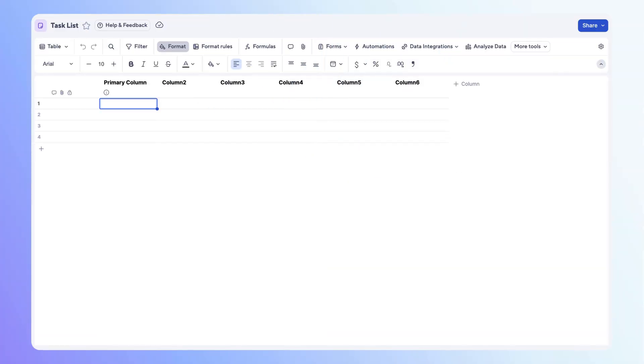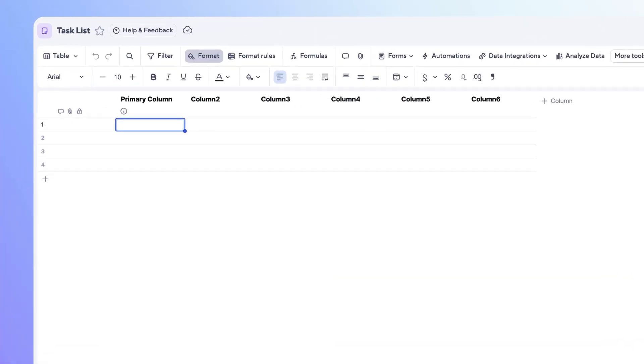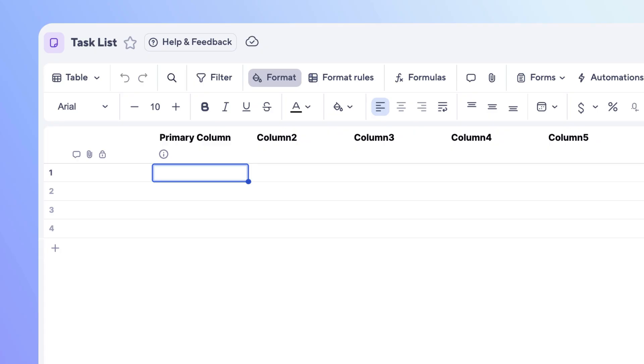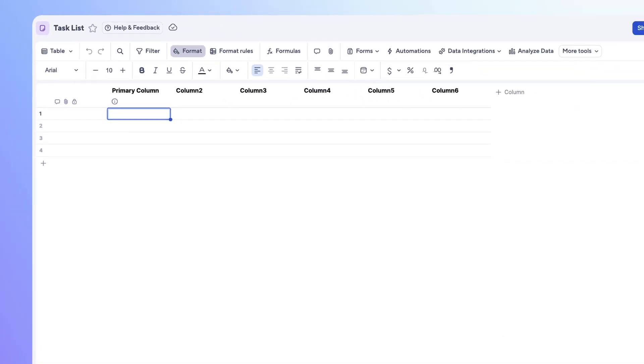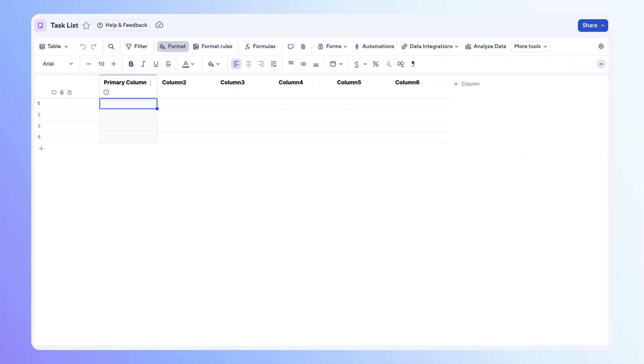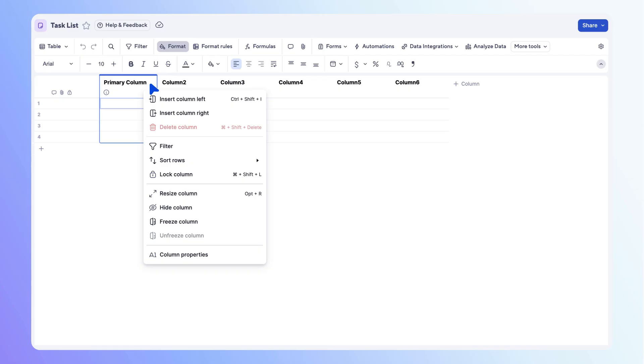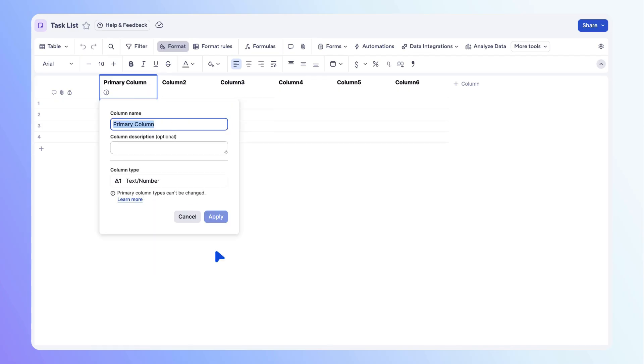Let's build a sheet for tracking tasks. First up is the primary column, which is the foundation of any sheet used for key information. It's the only column that must be a text number column type. To change the column name, open the column options menu, then select column properties. Here you can change the column name, add a description if needed, or change the column type. However, remember the primary column must be a text number column. Let's change the column name to task name, select apply, and enter the task names into your sheet.